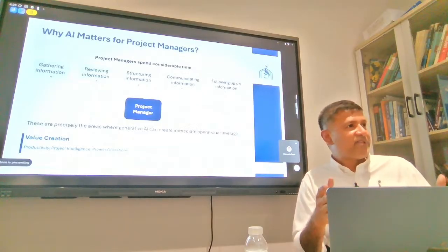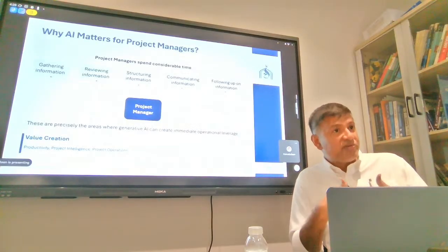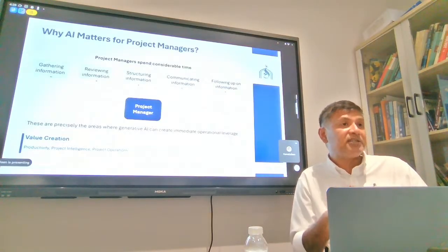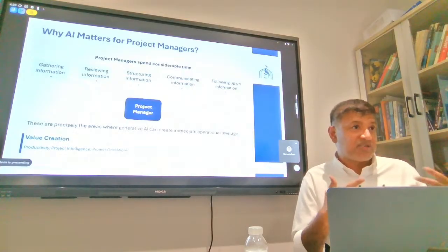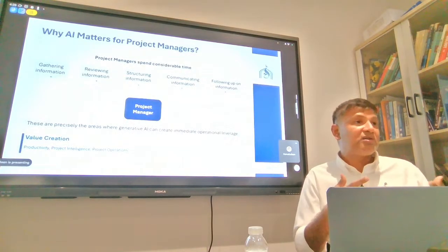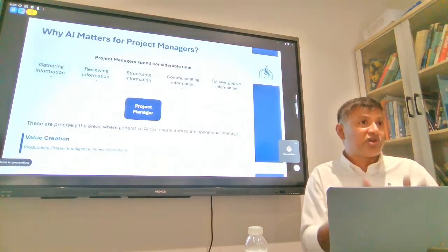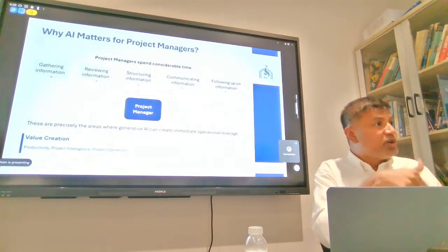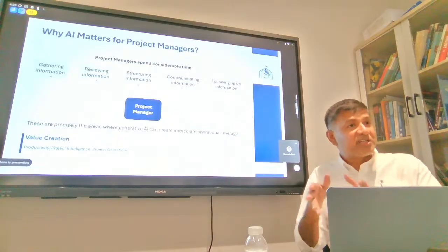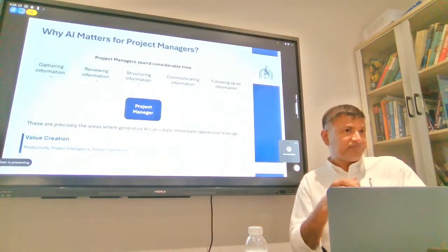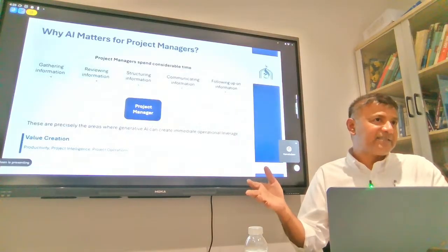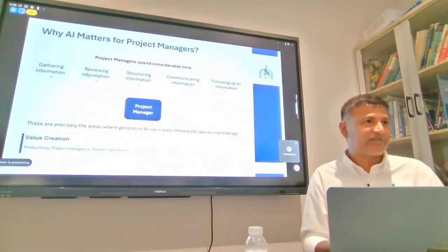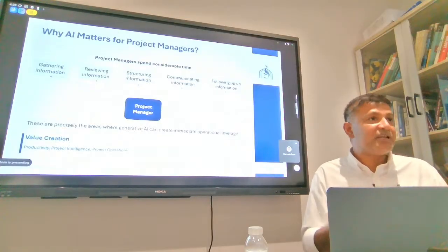So I was part of that project. As a software team, we built all the requirements, everything is done. But later we came to know that from the municipality of Saudi Arabia, there are a lot of constraints when you construct a building on a highway, when you construct a building on a 20 meters wide road, when you construct a building in an urban area. So we did not consider this when we started building our tool. So what happens? It becomes a big failure. So this is what I mean by gathering information.